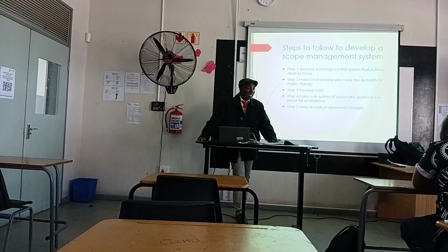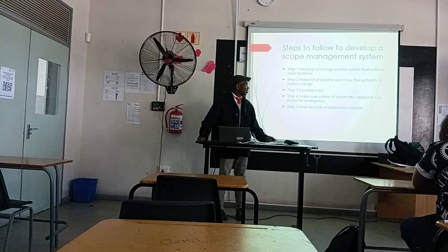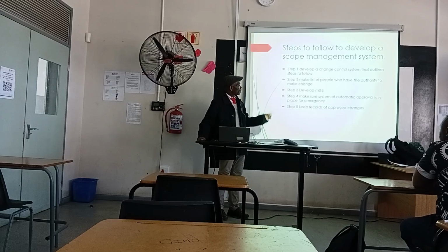So you must designate specific people and give them the authority to suggest a change in the project. Make a list of the people you've designated who have the authority to make the change.